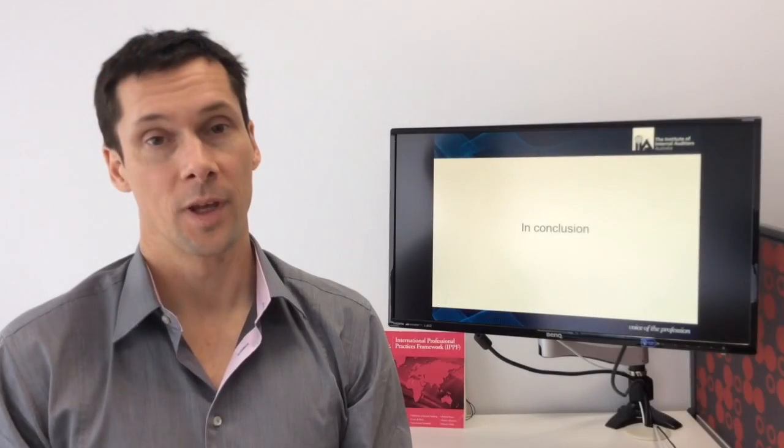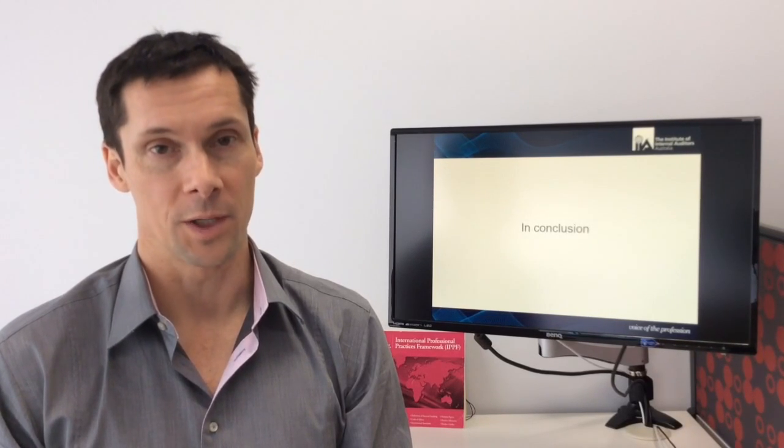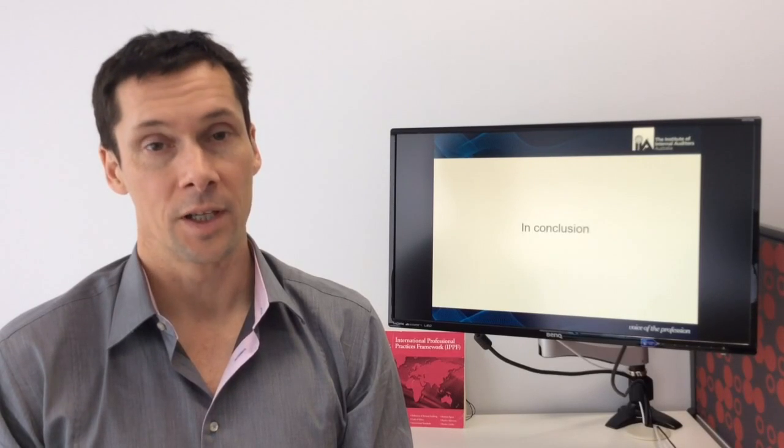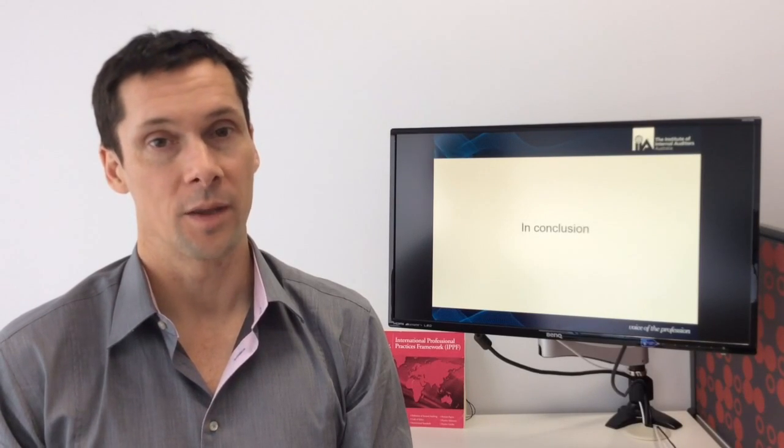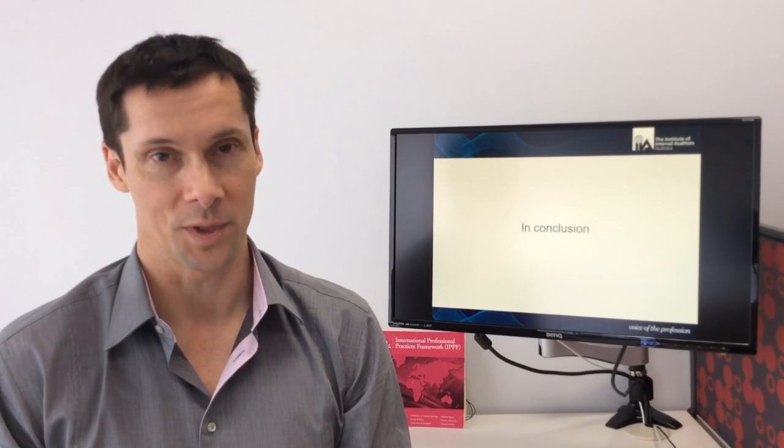In conclusion, a risk statement should contain the element at risk, the source of the risk, and the potential impact of the risk if it's realised. As discussed previously, some organisations like to separate the potential impact or impacts to make it easier to write a concise risk statement.